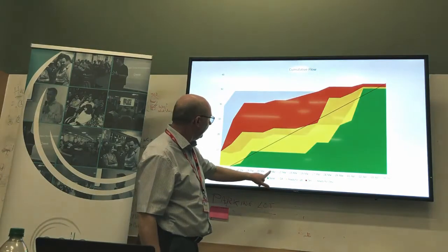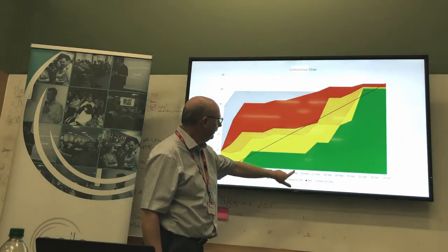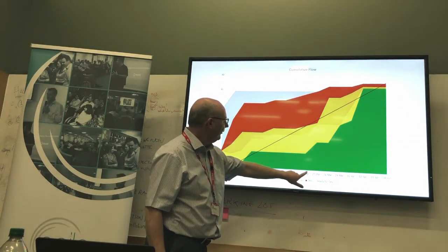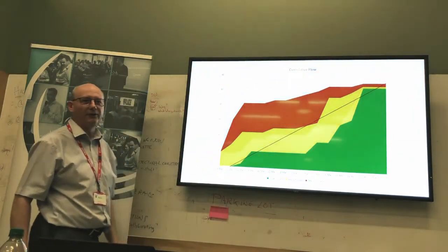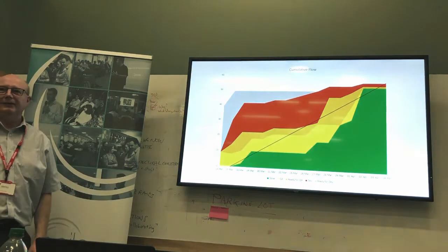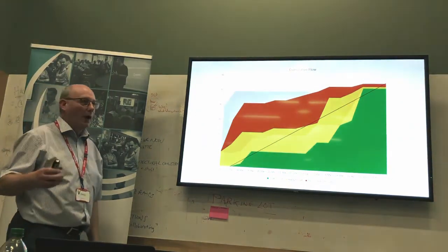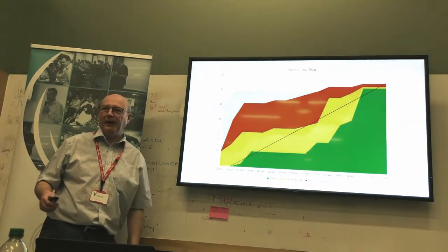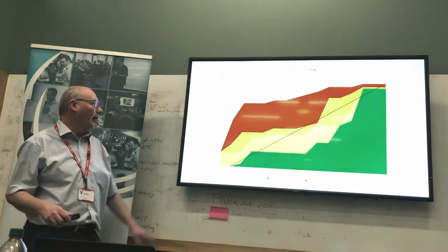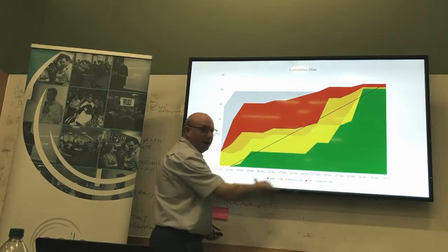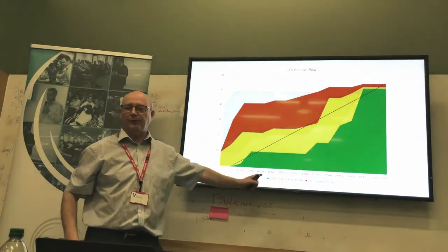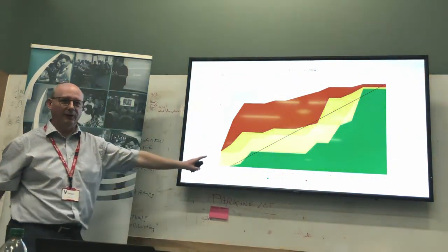So that's Thursday, that's Friday. Hang on, why is it still unproductive right through until about the end of Monday, sometime into Tuesday? They're still doing it. They're still thinking about it, they're still writing it up. You've only had a 24-hour hackathon, but look, you've had like a 3-day disruption. The disruption generally lasts twice as long as the actual event.